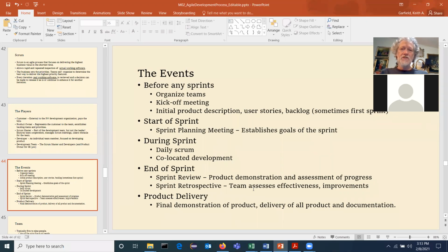This effort estimate is important. Consider yourself, think about this right now. You're going to do a 2-week sprint, you're one person. How many hours a week can you devote to the class? Okay, 8 hours a week. So in a sprint, you've got 16 hours worth of development time. The sprint meeting is going to take an hour. The end of sprint meeting is going to take an hour, maybe 2. Your team gets to decide that.